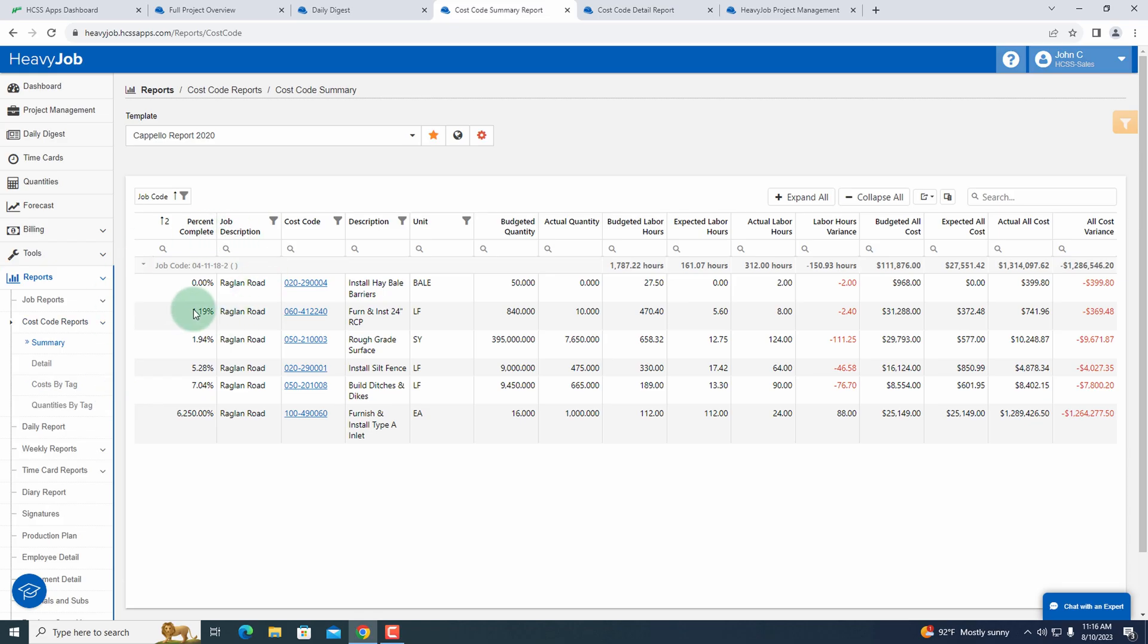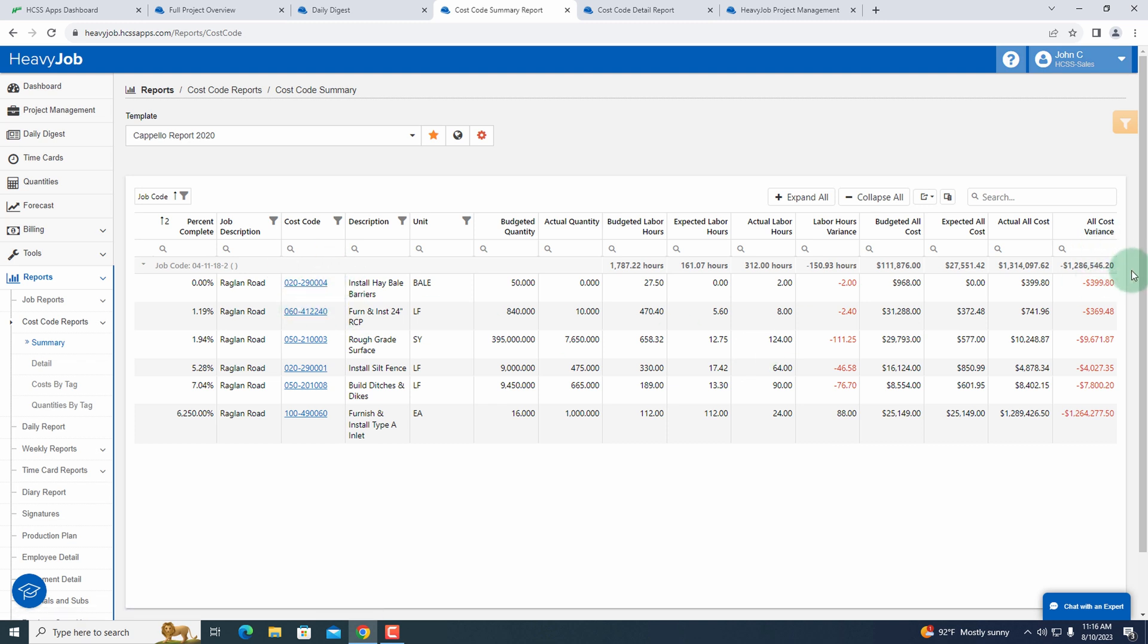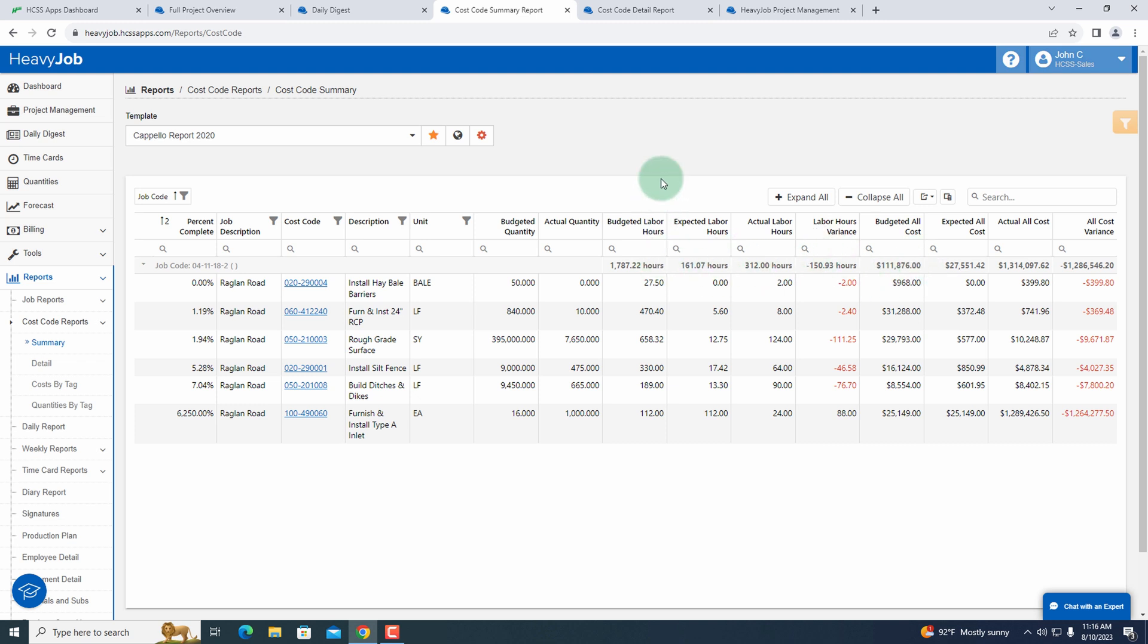Again, all of that information is being fed from the field. I can see my percent complete for this particular job, my cost codes, and my cost variance. Once I'm looking at my cost variance, the rest of this just becomes details and I can start to really drill in and see where I'm making or losing money.